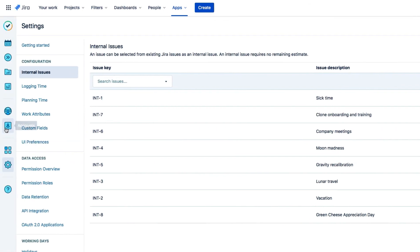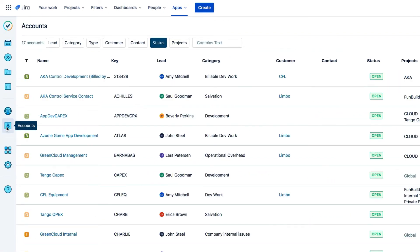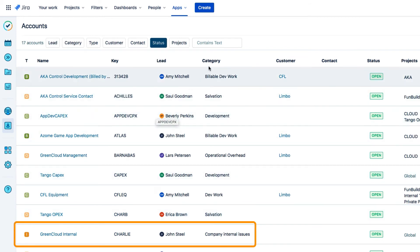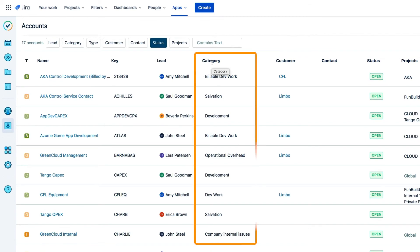The last step for internal issues is about using accounts. It's optional, but is generally good practice if you're working with billable and non-billable hours. In timesheets, time logged to internal issues may be included in the billable hours. But it's typical that these issues are not billable, such as vacation or sick time.